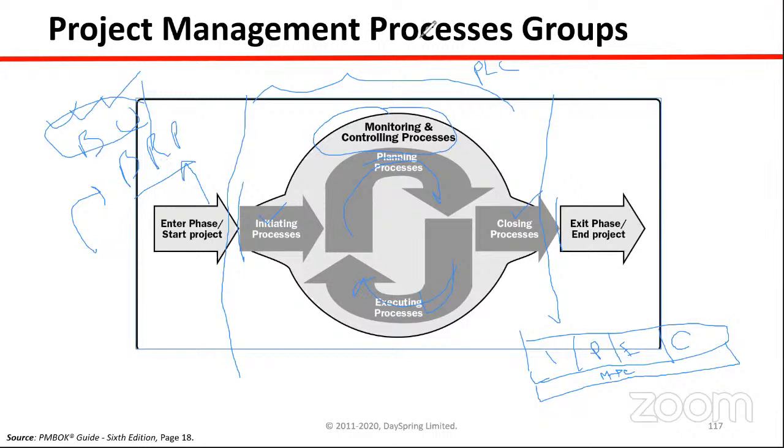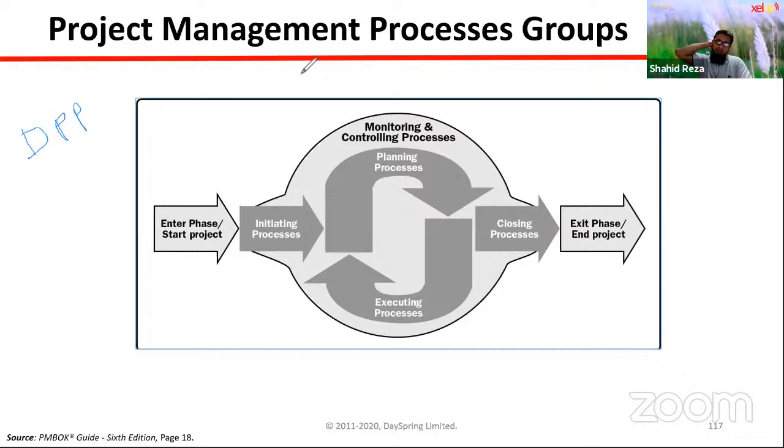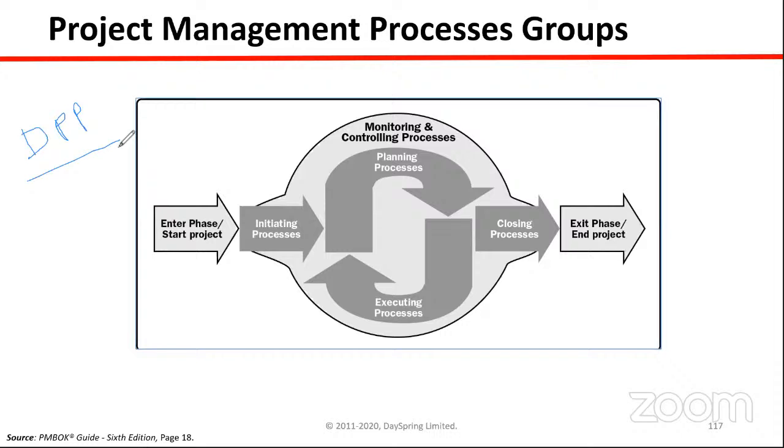In government projects, we usually don't have a business case. We usually prepare the DPP, Development Project Proposal. Proforma or proposal, both are right. When we use the proforma, we prepare the project, then it is a development project proposal using the proforma. But we usually don't have a business case.